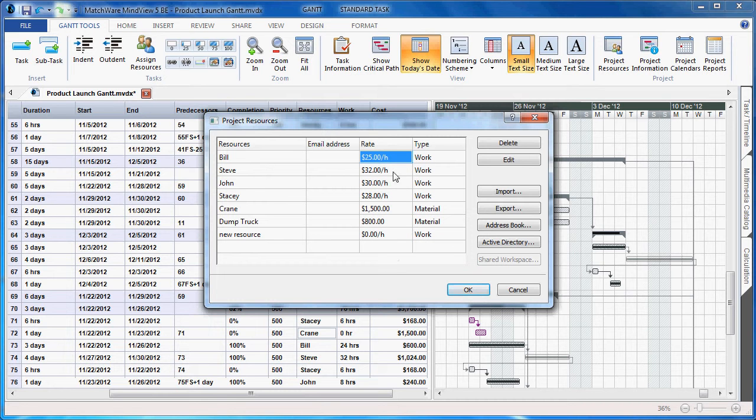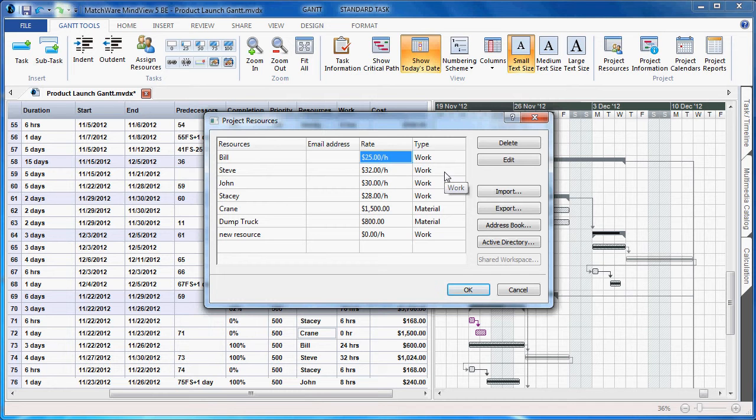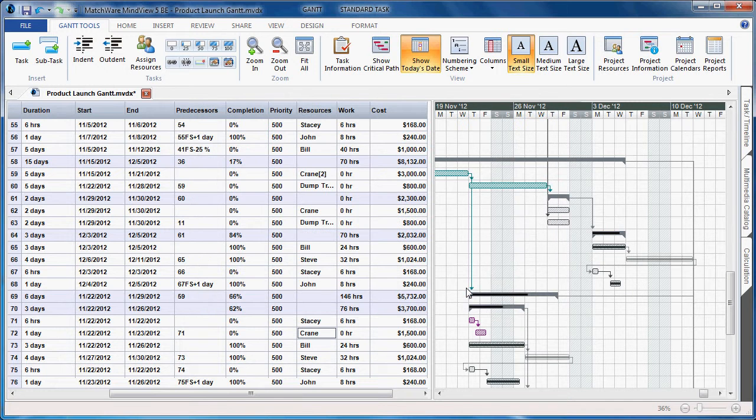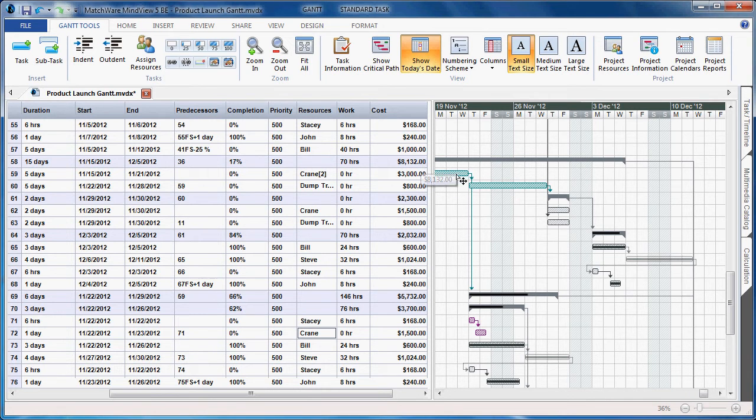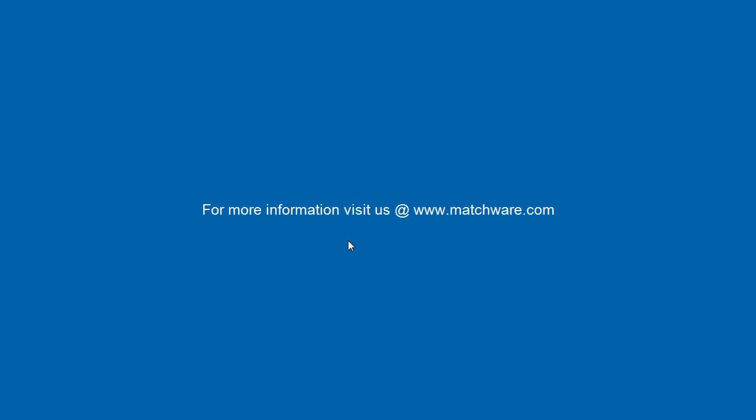By associating the additional information with regards to rate and type, when you view the Gantt chart information, you now see a column that calculates the cost per resource, per task, and summarizes in each individual group.